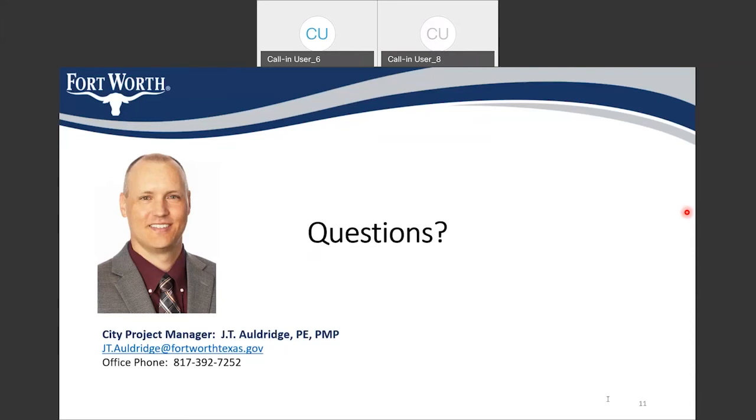Is the contractor in attendance, Chip? Yes, I'm here. Maybe he can elaborate on closing the park driveway. Chip, do you have any idea? I mean, an estimate, you're probably looking at about 2 weeks in. The way we're phasing the project, we leave the existing roadway open. We're going to be working on the east side of the roadway, getting as much done as we can before we switch to narrower lanes. So this is an area that we can work in without having to hinder any kind of traffic. So it will be towards the beginning of the project.